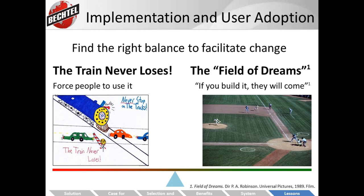And then we kind of group them in phases where we said, hey, phase one, these are the 2 or 3 features we want everybody to adopt. Phase 2, these are the features that we want everybody to adopt. Phase 3, these are the features we want everybody to adopt. It's a different approach than where we started out. We started out with, let's have group A adopt every feature, and then group B will adopt every feature.